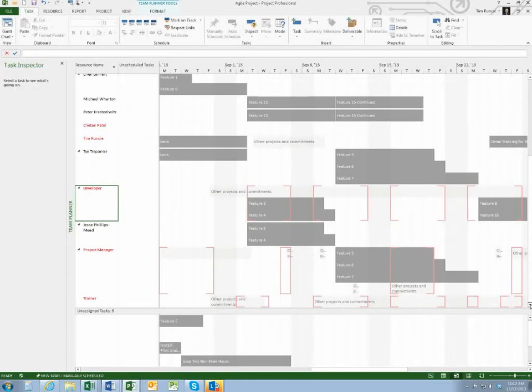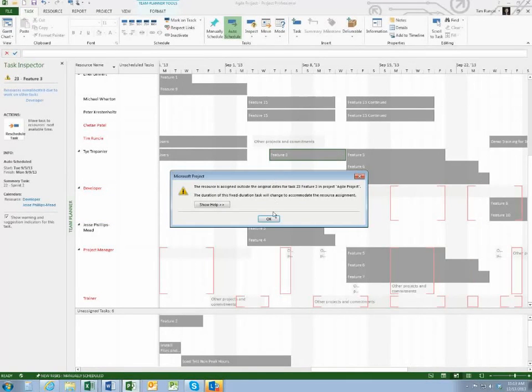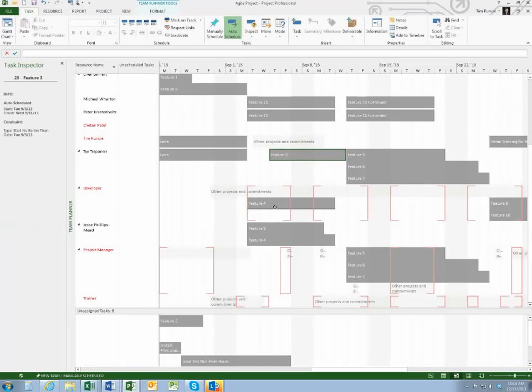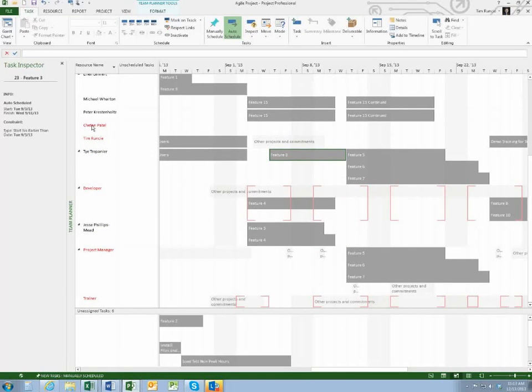So inherently, if I'm working with assignments, work, and activities, I can quickly see and spot where resource assignments are under or over allocated. In fact, if I'm connected to Project Online, I can also see tasks that are coming from other projects because you're in an enterprise environment. In some cases, whether we're using full manual scheduling or a series of auto schedules, I'm moving the assignments around. So if I need to allocate some assignment activities, say, look, let's drop this off on Ty. Our developer is still on other commitments, you can see here from Project Server, and I need to move work around, I have a little bit more of a touch mode environment to manage over and under allocation.